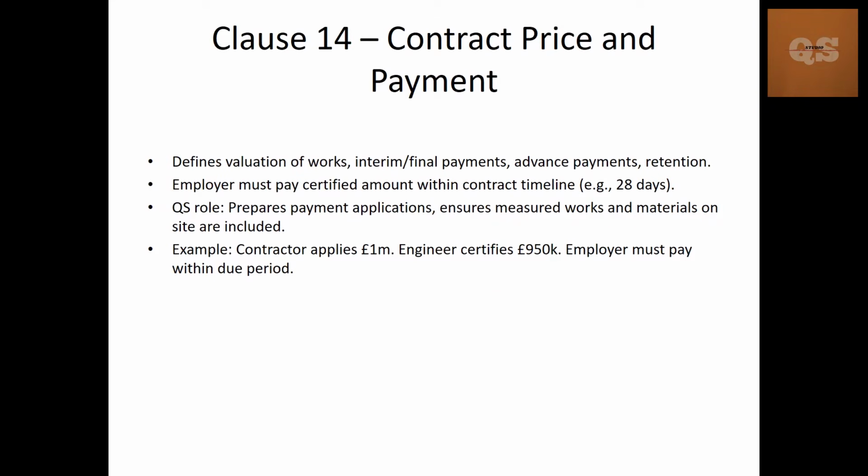Next is clause 14, which is contract price and payment. It defines the valuation of works, how you can claim for your works done, interim and final payments, advance payments, retentions. Every month you will have to get your payment certified by the consultant or the main contractor.